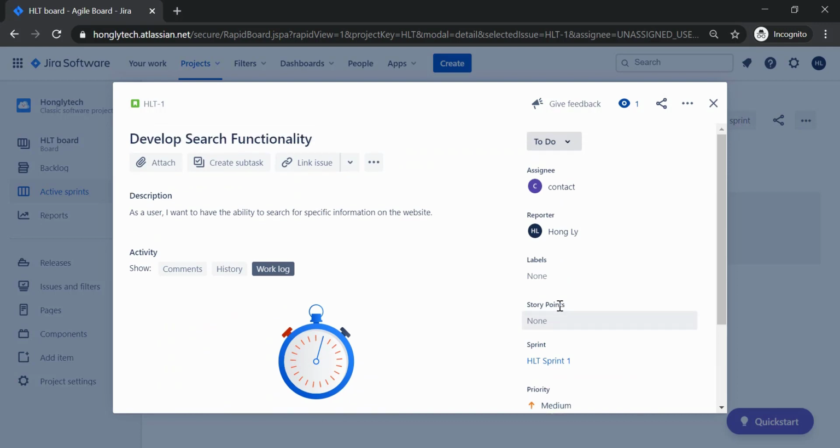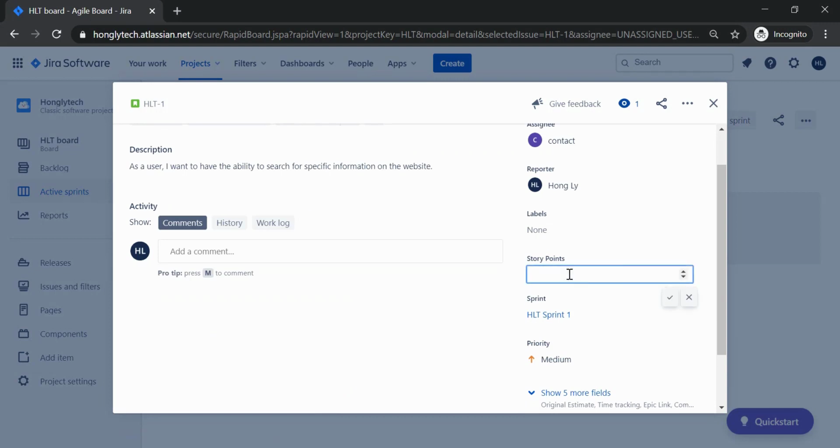So in this story, I would give the story points. So 1 point equals 1 day. In a sprint, it would normally have 10 points in total, but I would suggest that around 80% would be awesome. So you would think about having 8 points inside one sprint, just to give a little bit of a buffer for the other 2 days or 2 points.